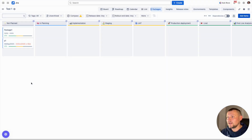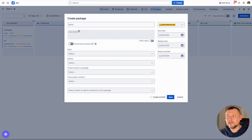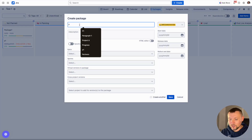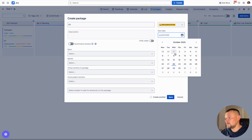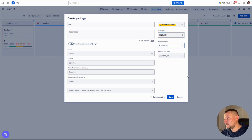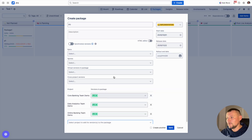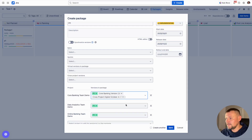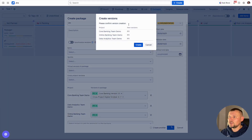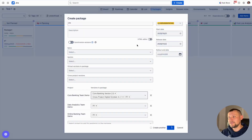In addition, we can use packages for top-down planning. In this case, we create a package without any releases inside — for instance, let's define 'Product Increment 1'. We can define start and release dates for when we plan to complete it. After that, we can select all the projects and release management will suggest creating releases for those projects. If releases already exist in the projects, they will be fetched into the package. We can also select a few more releases if needed, and after creation the package will automatically create releases in corresponding projects.